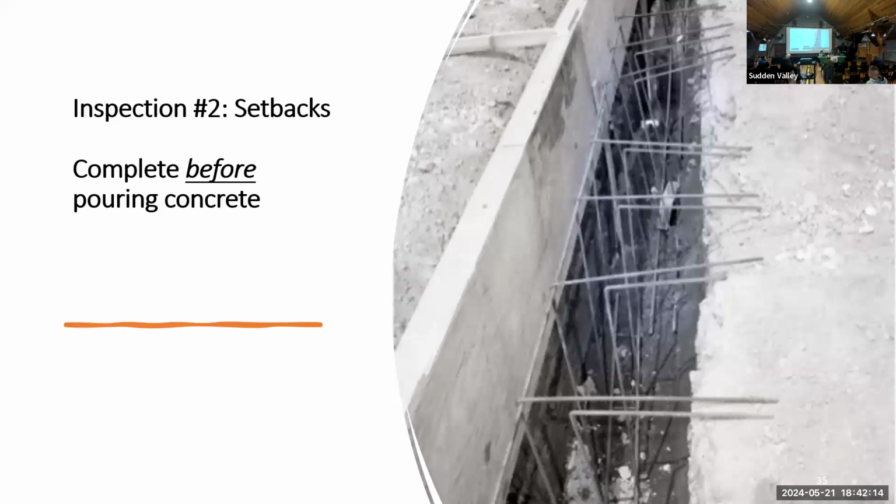So a common mistake is that the excavation is performed, the forms for the footings are set up, and then the erosion control and the setback inspection are called for, but it's too late for the erosion control. So make sure for this inspection, this has to be done before you pour any concrete.